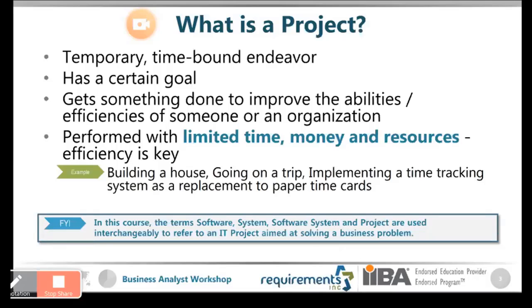For example, if you have limited time, then you'll have to throw in more resources and potentially more money to meet that timeline. And if you are running short of resources, then you'll have to spend more money getting expert resources, for example. So take away one of these, and the other two become stretched. You have to be cautious about efficiently managing these three things.